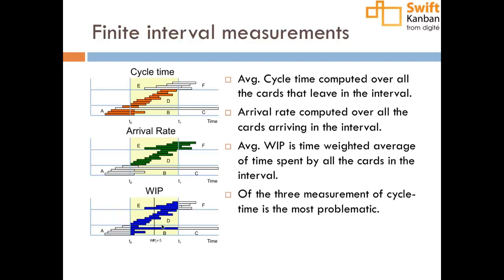I think Little's law is to be used as an axiom of faith more than anything else, and it may sound a little strange, but it's a law that applies to the underlying physical system when you think of a Kanban board as a queuing system. So if you reduce the width, let's say we are able to hold the same throughput, and we have reduced the work in progress, it tells you that by reducing the work in progress, I will get improvement in my cycle time.